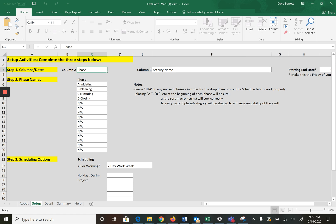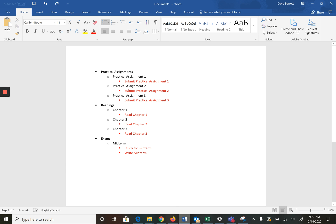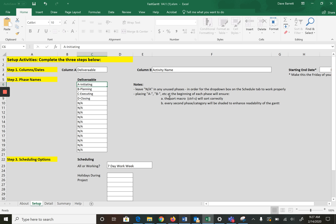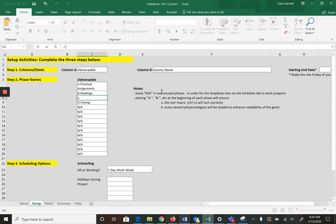You should go into the setup at this point. For this assignment I recommend not going with the traditional phased approach but what I think makes more sense is to organize by deliverable. At the high level we'll see practical assignments, I recommend keeping the A there because it helps for sorting. Readings was the second and exams third.